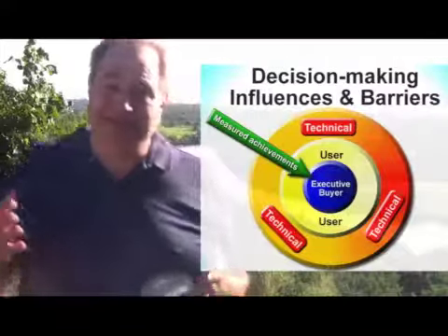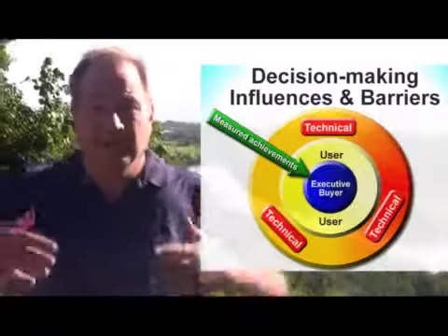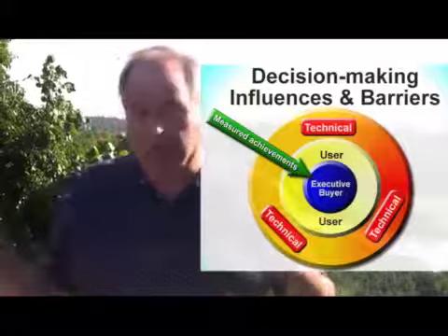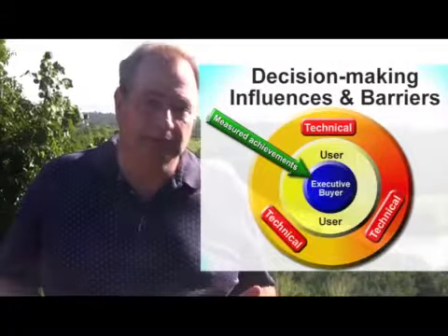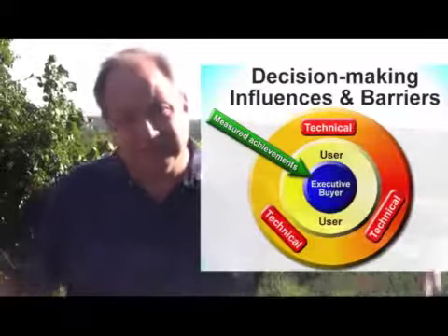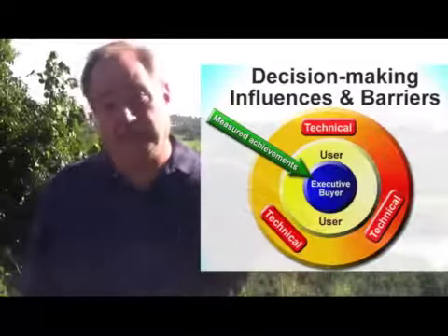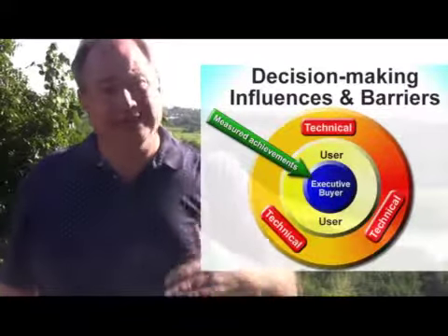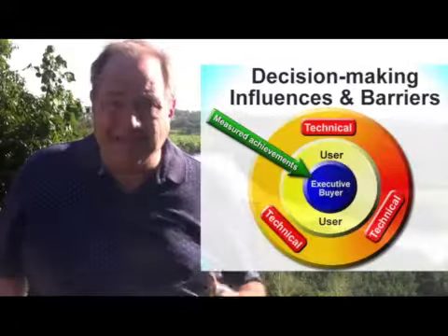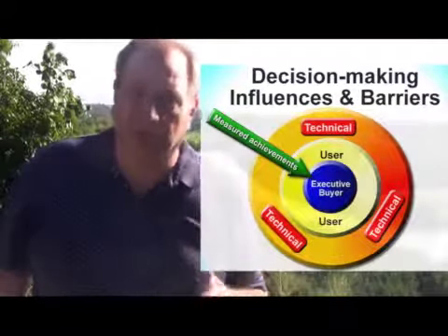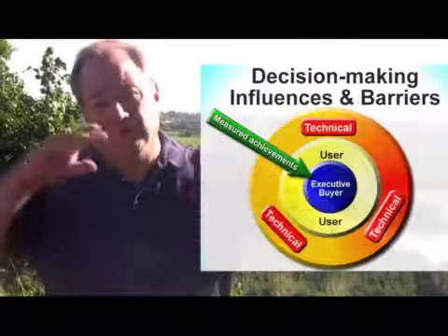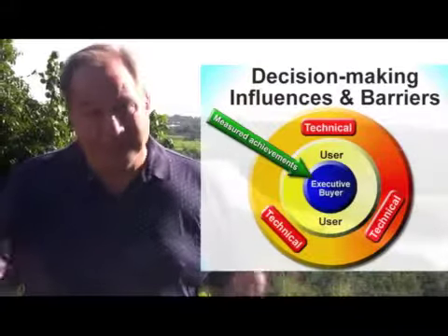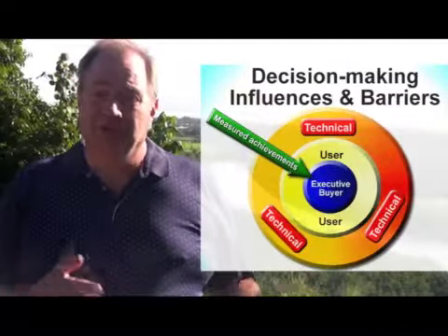So we have to ask the executive questions about who these people are, who the user decision makers are, secure approval to go talk to them, and that's not usually a problem. We'll also find out about who the technical decision makers are, and these may be buyers in purchasing. They may be interface people in the operating departments who deal with the facilities or IT project teams because the users don't want to talk with them. So we have to identify who these people are and set up times to go out and meet with them to classify the performance pressures they feel.